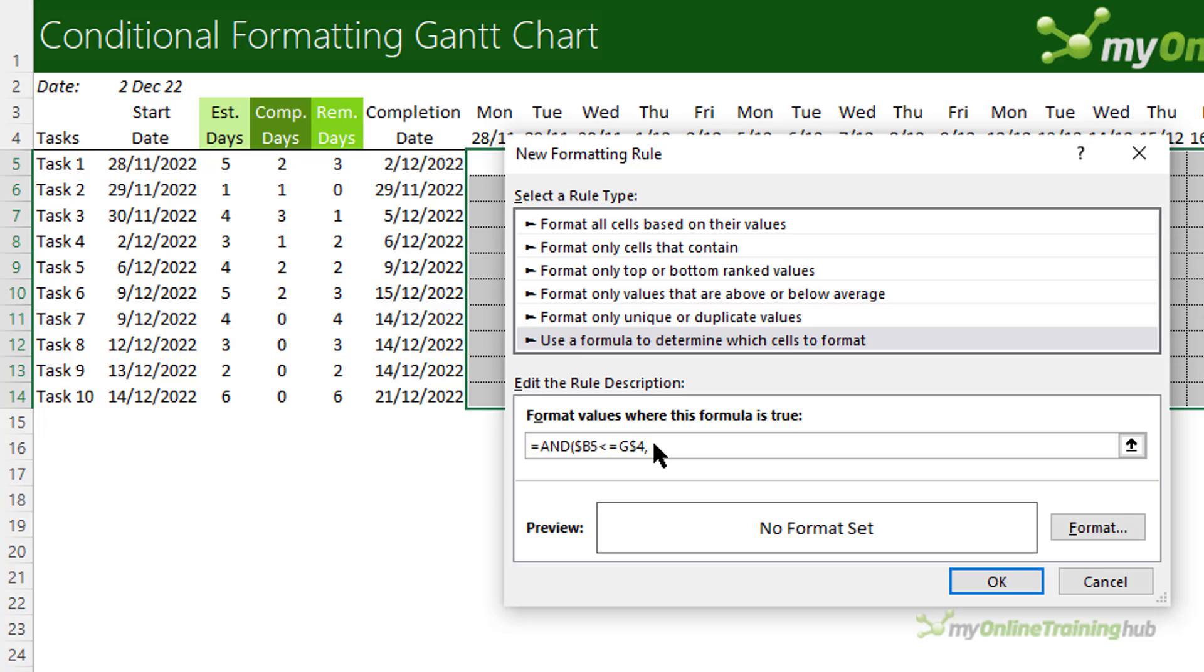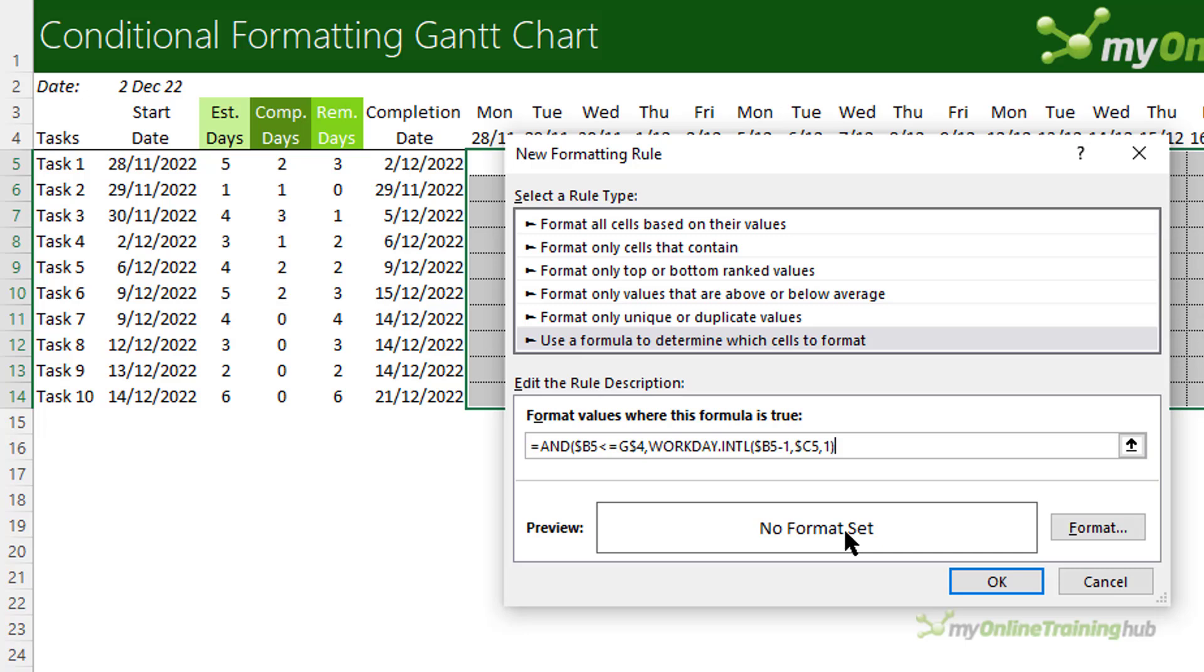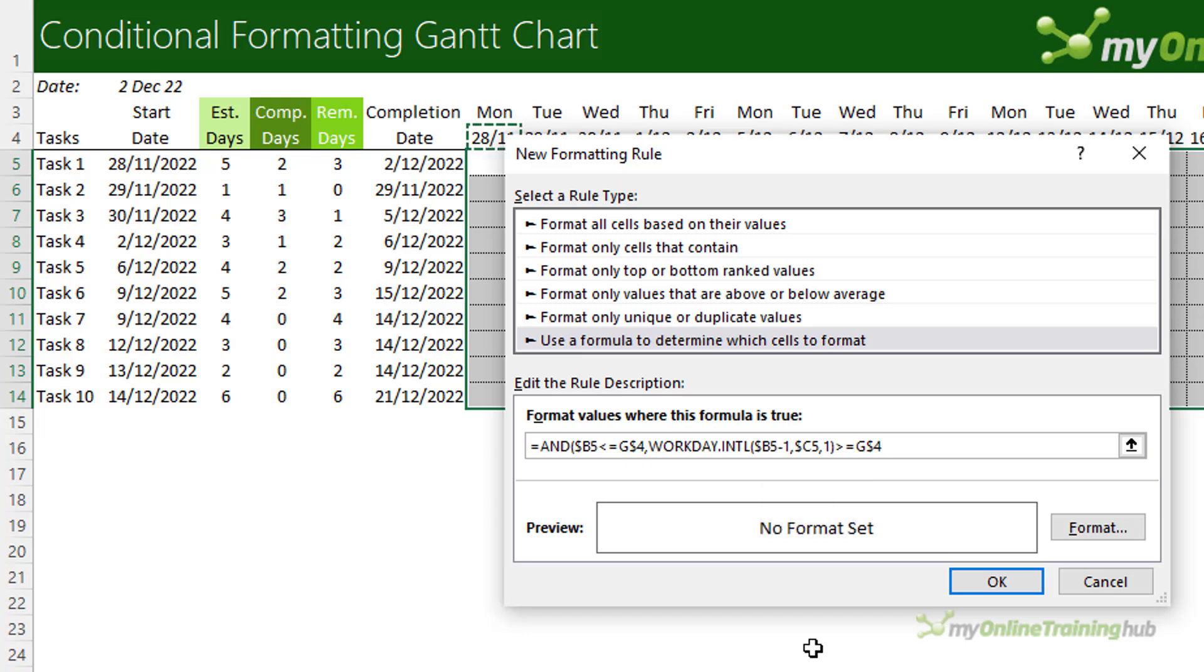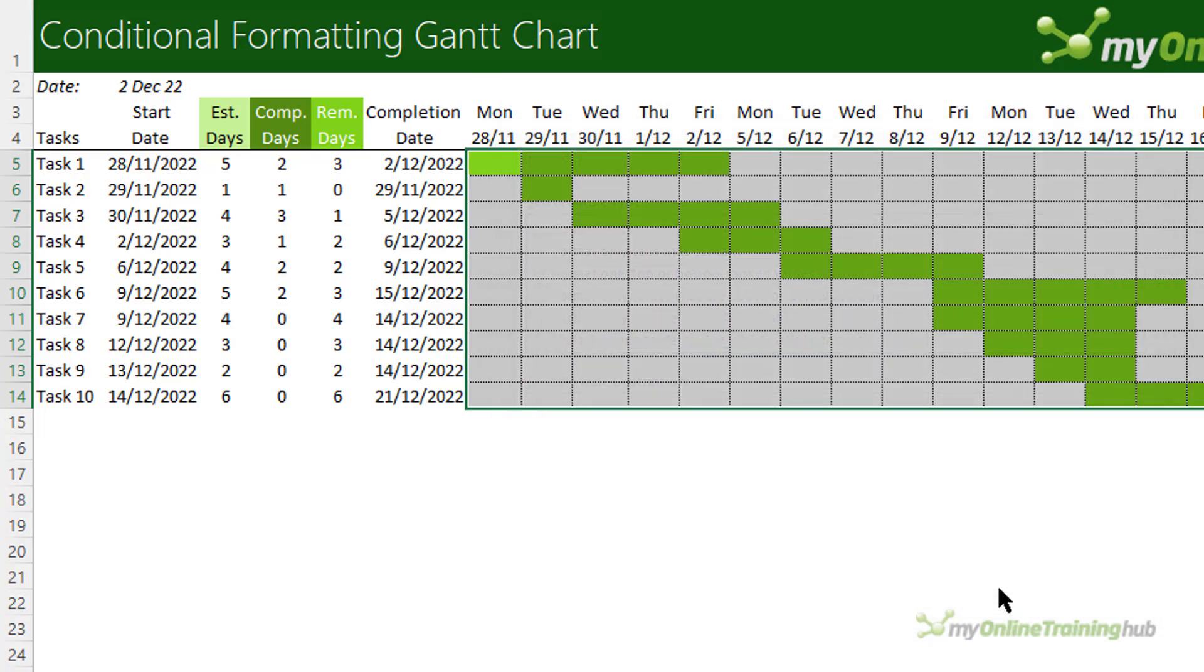So that's my first logical test. And then we're going to use WORKDAY.INTL again to find the end date. So reference the start date minus one, and then we're adding the estimated days. And then our weekend dates are type one. Let's just go and fix the absolute referencing here. So we want absolute reference on the column there and there. I'm just using F4 to toggle through. So I'm comparing the end date to see whether it's greater than or equal to the date in the current column. And we're F4 to absolute just the row. And I'll close parentheses on AND. Let's go and apply the format. I want a cell fill color in this bright green. I'll click OK and OK.